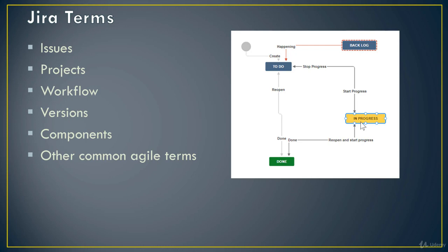In fact, remember how I said that an issue can be of various issue types, such as epic, story, bug, etc., and a project can have different issue types associated with it? So for example, a software dev project would definitely want the issue types of story and epics, and maybe even tasks, but a general task manager project would only need the issue types of task and subtasks, and not really need stories or epics since it's just a general task manager and not a development project.